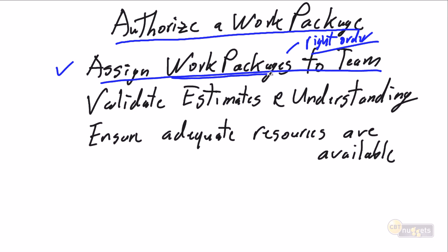Picking which work packages to work on is not at the team's discretion. Assigning the work packages is absolutely the responsibility of the project management team, and that is to ensure the right work packages are assigned to the right team members in the right order to allow us to achieve our project schedule. And then with the work package assigned, the next key activity is to validate the estimates and the understanding.